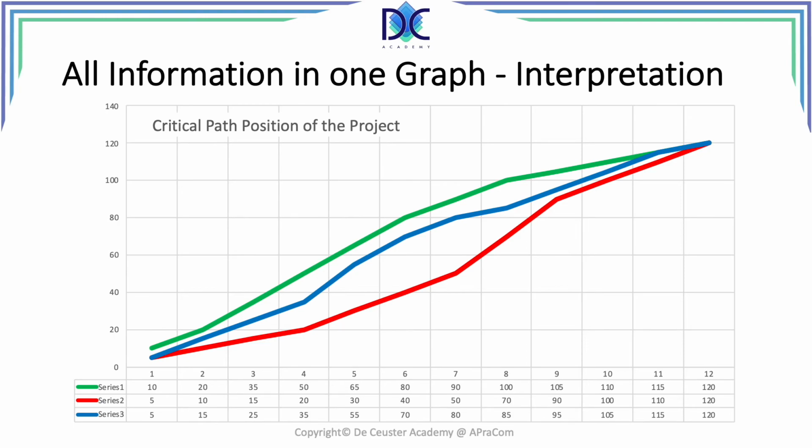There also may be other reasons to change the start times and duration of activities. In some cases, some activities have a lot of slack. It increases flexibility of the project by reducing the slack and starting the activities later. Of course, we have to see to it that we don't reduce the slack to zero, because it would increase the risk level of the project.